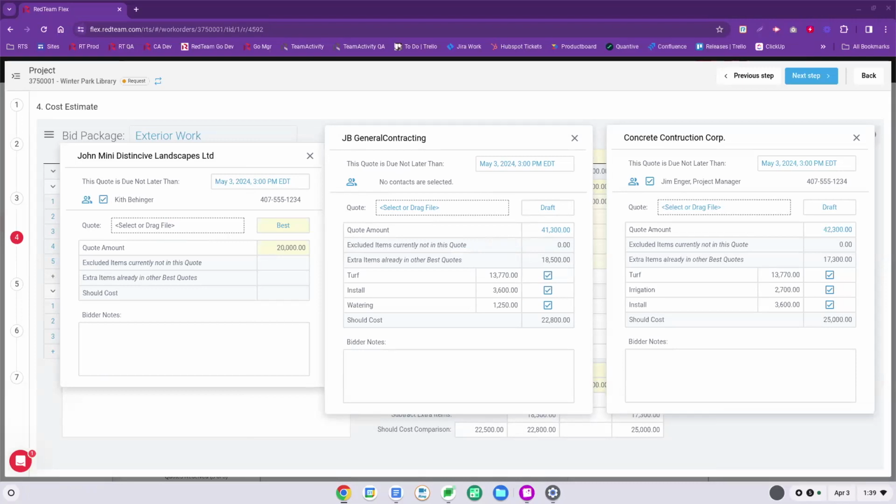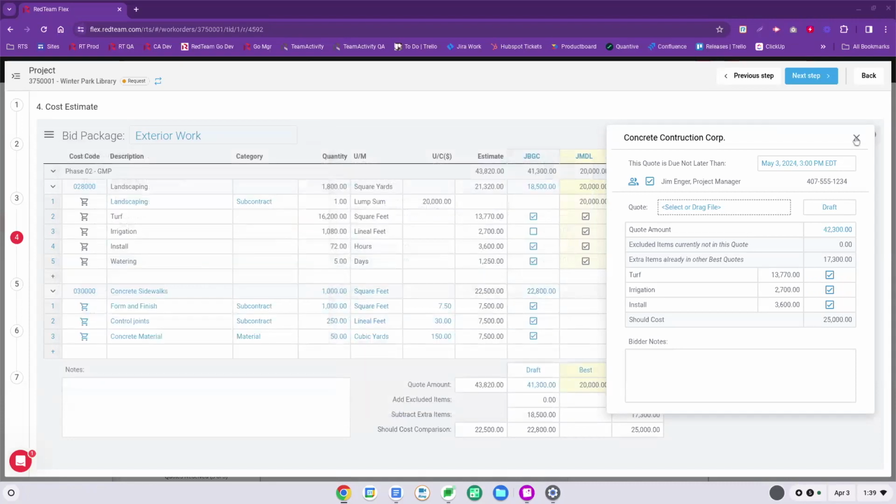And as you select bidders, the quote card then summarizes those leveling adjustments by bidder. So I can see what items are missing, right? What scope maybe I need to get from another source. What else do they exclude that I might need to buy elsewhere, is essentially the idea. And so that is what I get in my quote card.